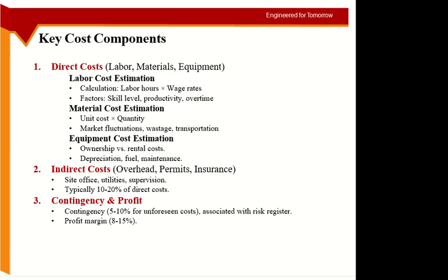Okay, you talk about steel, so you have to cut the steel into required sizes. So there could be small pieces of steel which are not used at all. Okay, when you're using the formwork, especially the wooden formwork, it gets damaged when you are fixing it and then removing it. Okay, so some of the formwork would be wasted. Okay, and transportation cost, usually around 10 to 20%, around 20% of the cost is for transportation. Okay, so this is very important.